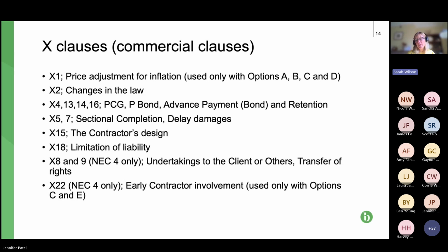So even if the contractor can then make a claim against a subcontractor or a consultant, it's likely that the subcontractor or consultant will only be designing to reasonable skill and care, and therefore any element over and above that, up to fitness for purpose, will have to be borne by the contractor. So that is a really serious point that contractors and subcontractors need to check when they're reviewing the contract, and make sure they don't fall foul of it.